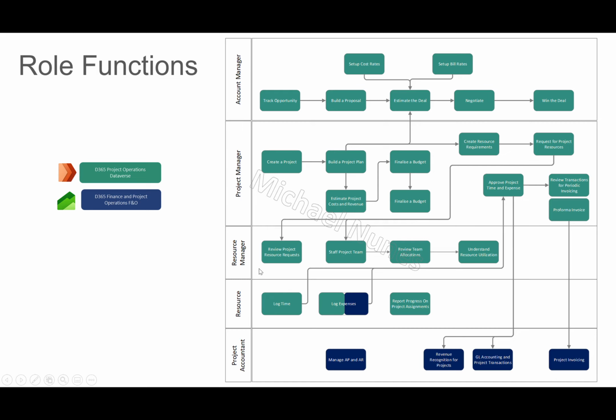Once we go down here to the resourcing team, they can review the resource requests that have been submitted that are connected to the requirements. They'll staff the project team by using the schedule board and then allocate the team to the project. Resources can then log time using the web client or mobile app, the project operations team app. They can log expenses, whether integrated or not. And all of these records all submit in for approval by the project manager.